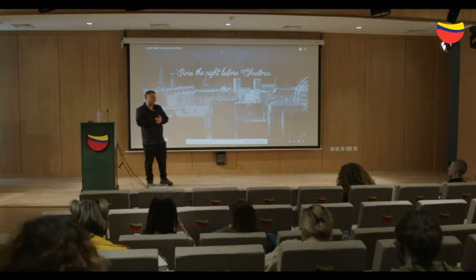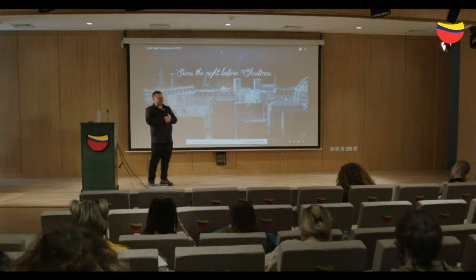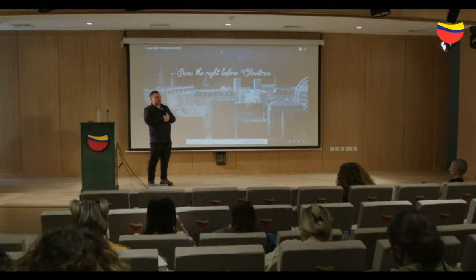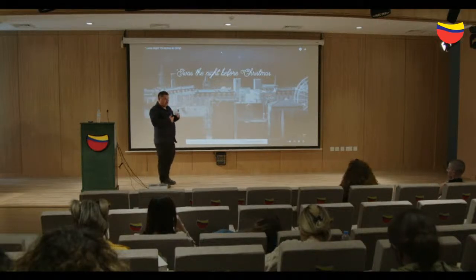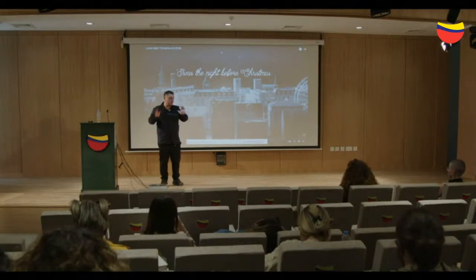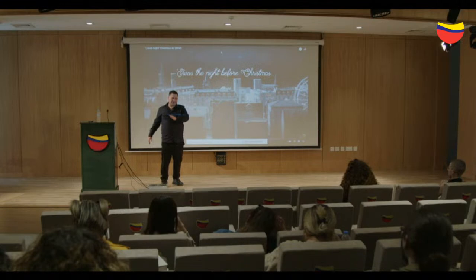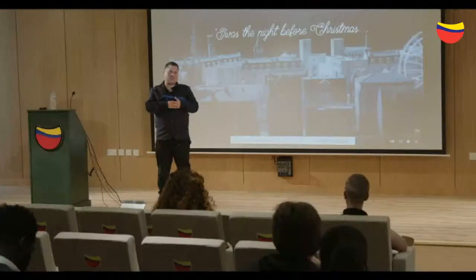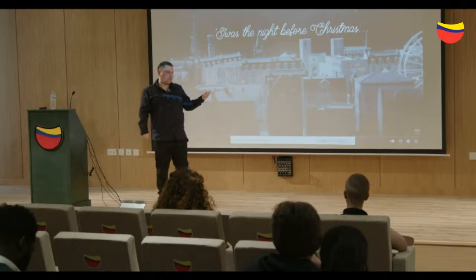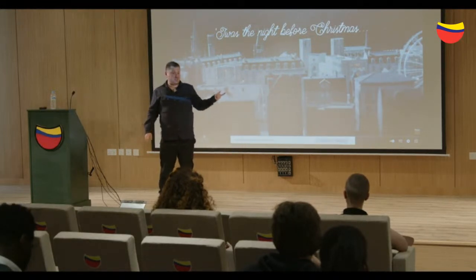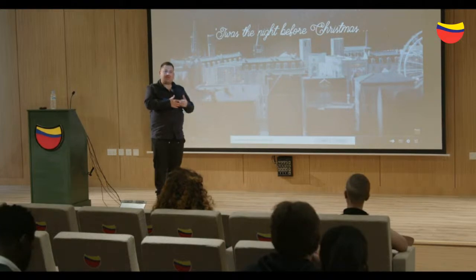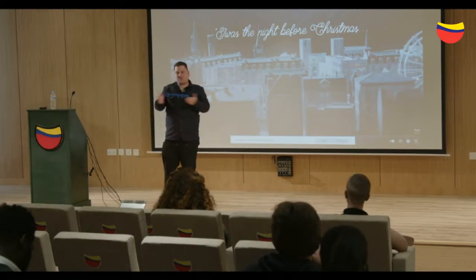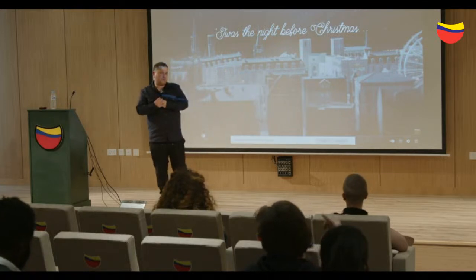And like specific people who are responsible for working with feedback, right? It doesn't go to the testers or developers. Well, it should. It really depends on how the company is set up, but in my view, it should go to the product team, who are managing the product. This feedback should be read and considered, and then the product team can say, actually, yeah, they have a point. Shall we make this change? And if they decide to make the change, then it gets put in as a change request for the developers to carry out, and then it will be tested by the testing team.